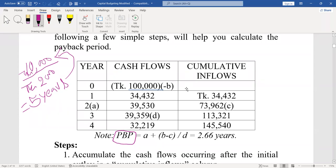The payback period formula is: A plus (B minus C) divided by D. We are given information about a project: if you invest Taka one lakh, you will get in the first year Taka 34,432; second year Taka 39,530; third year Taka 39,359; and fourth year Taka 32,219.